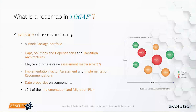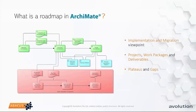There are date properties in the TOGAF content metamodel framework — things like when elements go into and out of life — so you can absolutely do Gantt charts using those properties. Ultimately a roadmap is arguably the first iteration or first draft of what's called the Implementation and Migration Plan, which is one of the deliverables from the TOGAF method. TOGAF has a pretty strong position on this — go and search for yourself to get good detail.